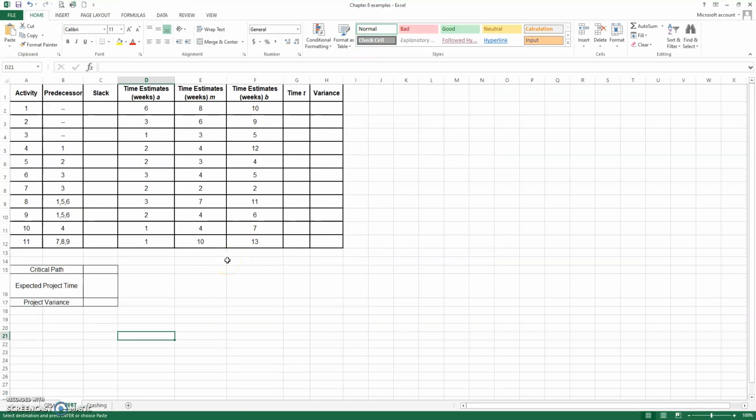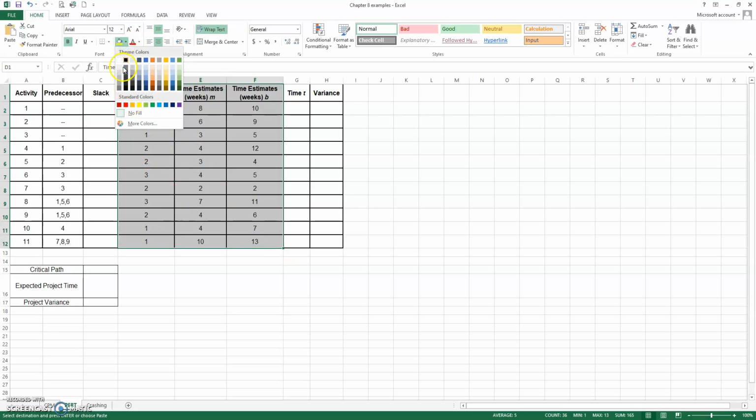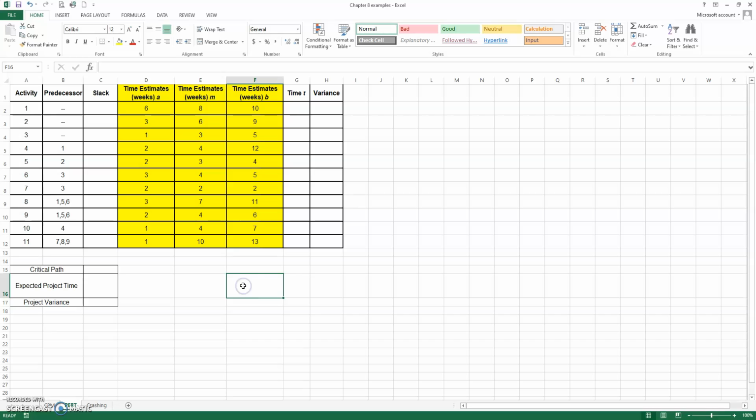Hello students, welcome to our second video on Chapter 8, Project Management. We're going to look at an activity or a project that has multiple times. So times are listed in these columns here. Let's color these. These are the optimistic time, denoted as A, most likely time, denoted as M, and the pessimistic time denoted as B. So we need to calculate an average or expected time.